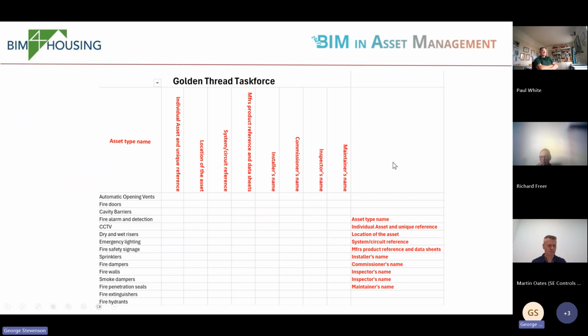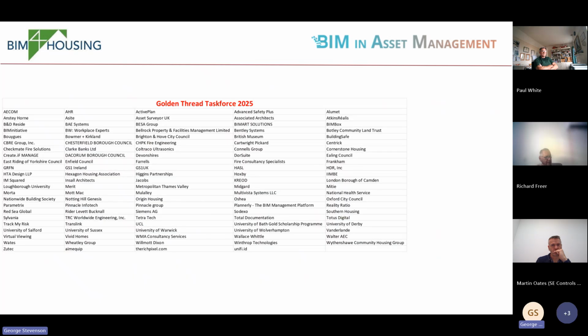So, for example, being able to audit the Regulation 38 handover information at a very basic level to say, what are the systems that have been installed and do we have the right information about them? And these are the things that we think are fundamentally required. Now, you need a lot more than this, Paul, don't get me wrong. But the point is, if you're not even getting this bit right, yeah. So that's at the moment where we are with